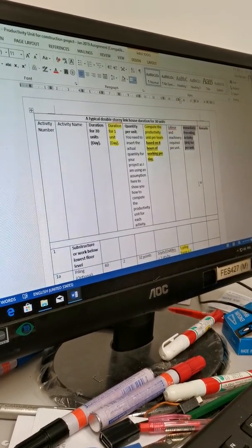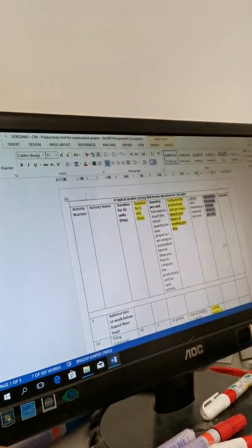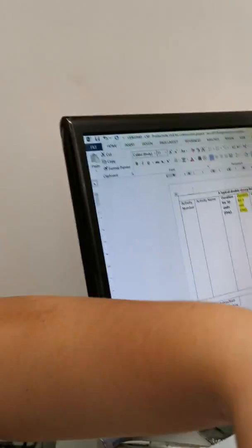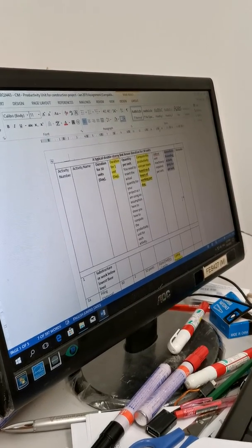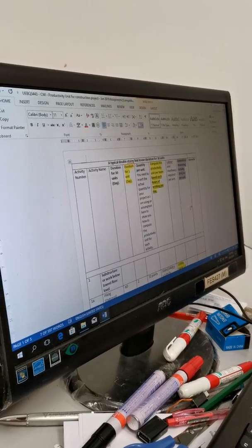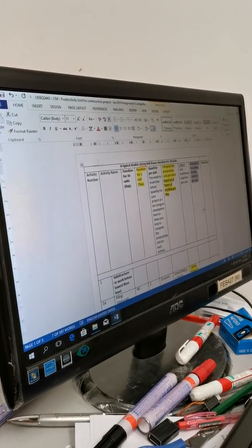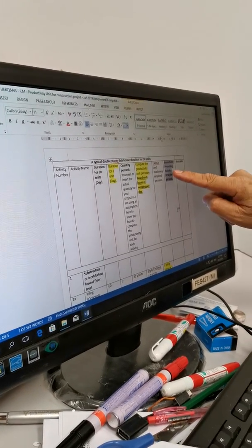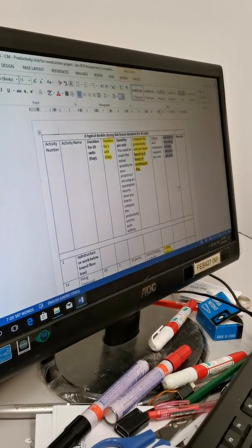This diagram drawn out will tell you how many workers in week 1, how many workers in week 2, how many workers in week 3, and also in week 1 how many machines, all these sorts of things. But the machine one, you tie it in terms of a block basis. But for workers, it will be on the unit basis, because this unit is for per one.